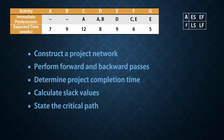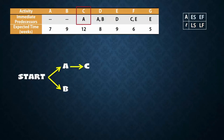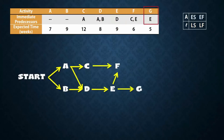I usually like to start with a sketch to make it easier when drawing the full network. Activities A and B have no predecessors so they can begin at start. Activity C needs A to be completed before it can start. D needs both A and B completed. E needs D, F needs C and E, and G depends on E. Since F and G have no successors, they go to finish.